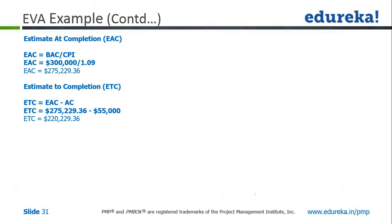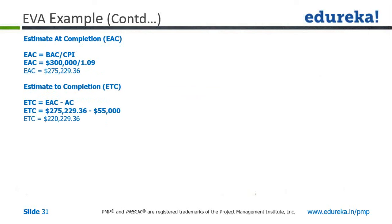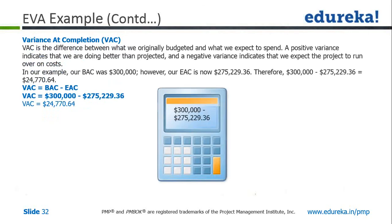There are more than 25 to 26 formulas which you need to go through when you read the PMBOK — there is no alternative to PMBOK. If you want to clear the PMP examination, you will have to read PMBOK, where you will get detailed information on earned value and a full list of formulas. We also have variance at completion — using this formula, we can calculate that at this pace, we will have a positive variance of $24,000 at end of the project. Again, negative value is not good news and positive value is always good news.